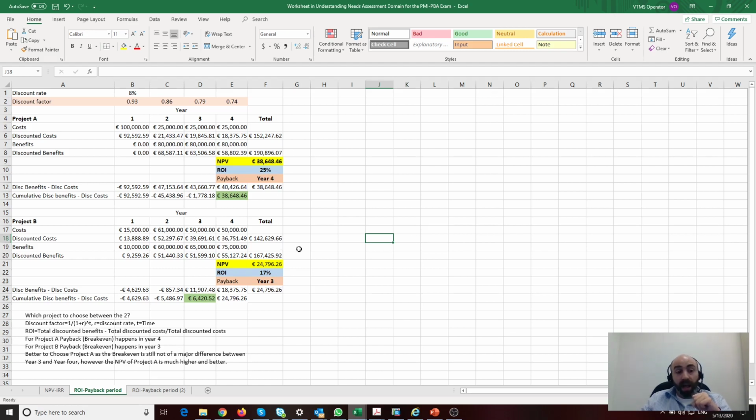to go with project A than going with project B. However, again, a clever business analyst will ask questions, not just go in now. If I made a mistake, you should stop me and say, Michel, what have you said in the earlier presentations? At least ask, how long does it take to finish that project? Because project A might take 7 years to complete, and project B might take 2 years to complete. Then definitely B is much better than A, because all of this will be shifted to the right.